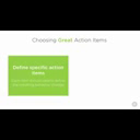First, as Louise mentioned, this plan will be comprised of action items. I would encourage you to keep your action items specific enough that we can unambiguously evaluate as a team at the end of the next sprint whether or not that action item was successful. This also means that the action item should clearly spell out the behavior change that we are seeking, not just vaguely state that we should improve in a certain area.